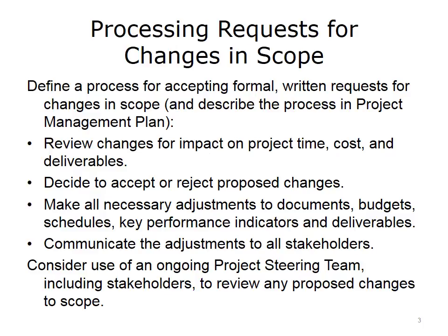As you are managing scope, remember the importance of explicitly processing requests for change of scope. It's not that scope can never be changed, only that you ought to make it an explicit process when there are requests to change the scope or change the requirements on the project. It is important to have a clear path for accepting requests for changes like this, and a process for evaluating those changes. Then the project team can determine the impact on project time, schedule, costs, and deliverables. These implications will guide the decision to accept or reject the proposed changes.